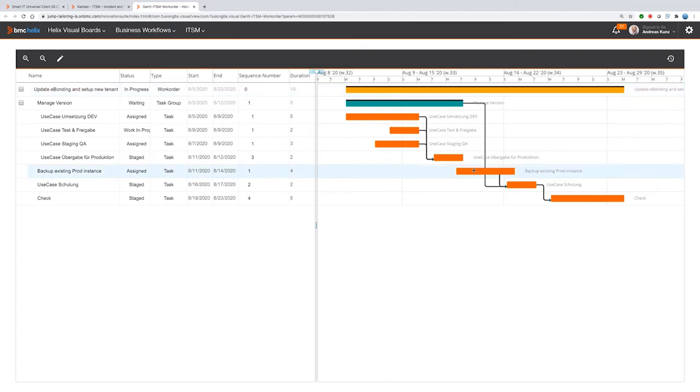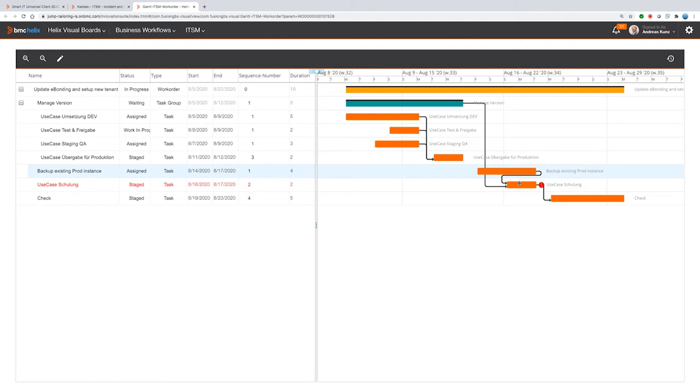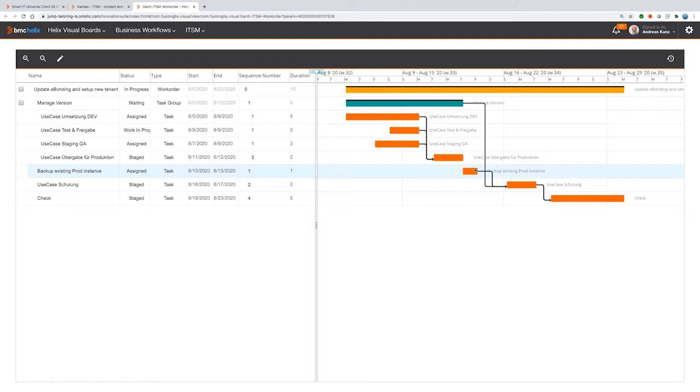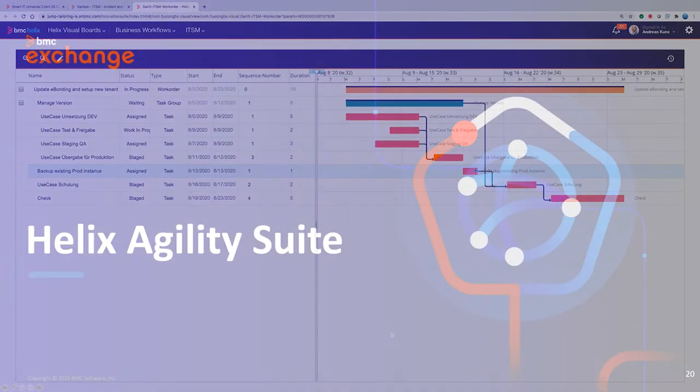And there could be, for example, a wrong planning, that the timing of the task is not well done. For example, now it will display an exclamation mark and a red line that the end of a task with the successor will not be met. So you now can easily, for example, shrink the time, move the task around just by drag and drop and can solve your problems. So that's all for today for visual boards.